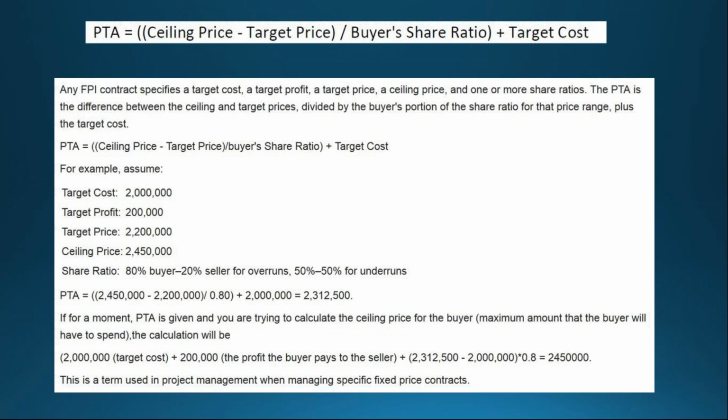Okay, so we're going to go from one point between two boundaries, we're going to share risk up to a point. After that, which is called the point of total assumption, you're the guy that's got to finish this out of your own pocket, you Mr. Contractor. Okay, and again, at that point, it effectively becomes a fixed price contract. Okay, let me show you how you do point of total assumption. All right.